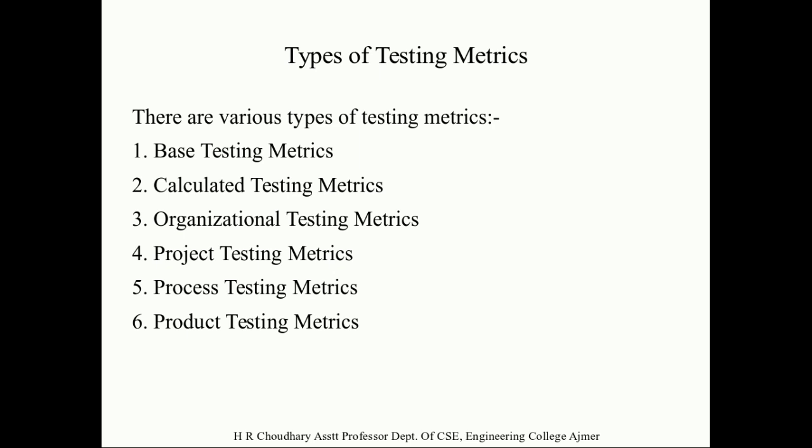So at the start of the system test phase, for example, the project manager estimates the total system test effort. The ratio of the actual to estimated effort is 0 prior to the system test phase. This ratio builds up over time, and tracking the ratio assists the project manager in allocating test resources.